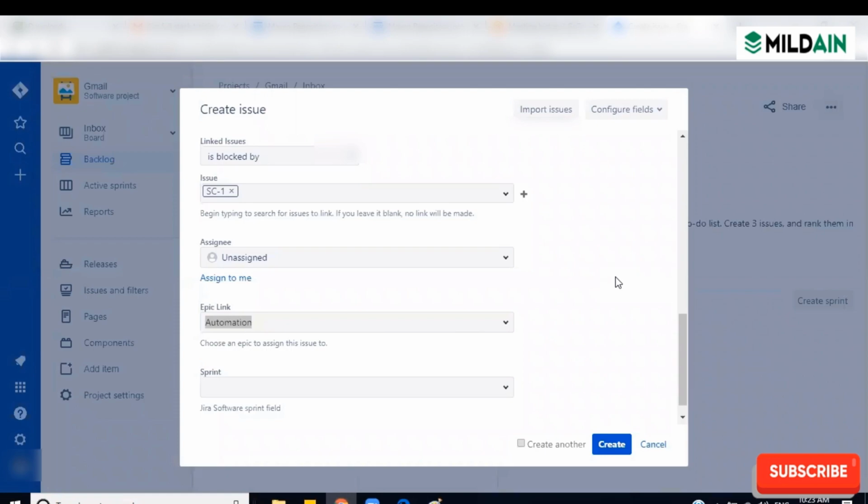If yours is a weekly sprint, maybe you will get 4 sprints. Then you will create 4 sprints here, and in each sprint you will be selecting some stories. So in sprint 1, you have 4 stories, and all the 4 stories will be tagged with the 1.0 version number. Once that is done, he will create one more version, that is 1.1, and he wants to release it by November 15th.